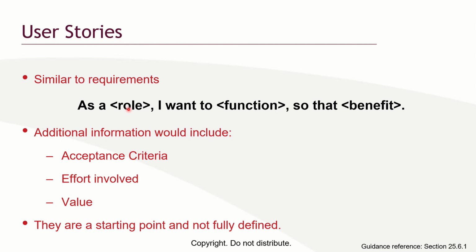If, for example, somebody is performing the role of a finance manager, and the user story he has given to you, if the person leaves the role tomorrow and becomes CFO, Chief Financial Officer, the new person who comes to that role, the same user story will apply to the person, because a user story is aligned to roles, functions, and benefits. So the statements of the requirements of any user should be aligned to this user story.